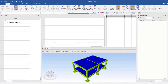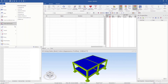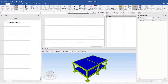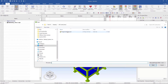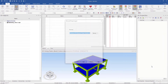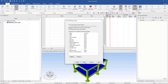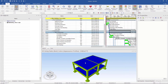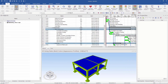We will import the Microsoft Project Schedule. We again go to Files, then Import, and select Microsoft Project XML. We select the corresponding schedule and proceed through the import steps. Finally, we can see the tasks and the corresponding Gantt chart.